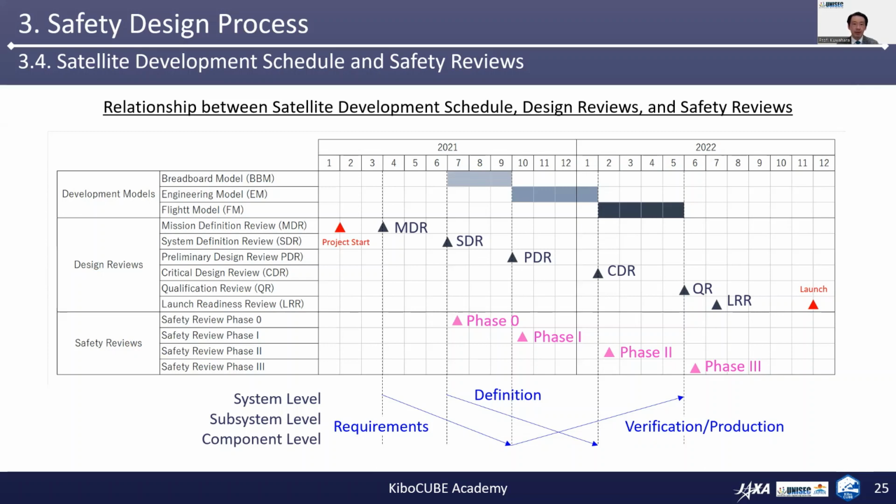For example, you can possibly arrange to hold safety review phase 0 and 1 just after the PDR, or phase 0, 1, and 2 just after the CDR. So it depends on the project schedule and the technology readiness level applied to the satellite. The relationship among the system engineering activities is also illustrated below.